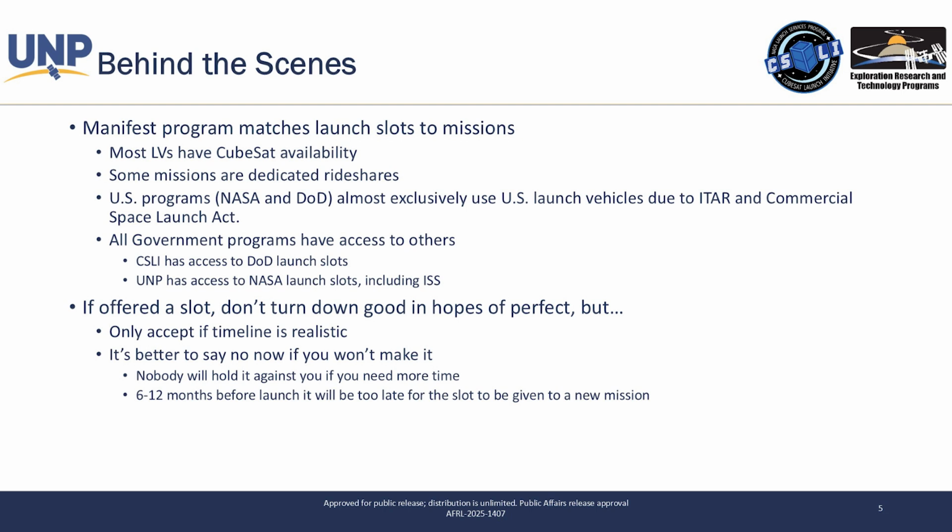The only reason you probably should not accept is if the timeline is not realistic. It's better to say at the very beginning of a slot that's offered to you if you can't make it, rather than trying to make up ground, trying to make up development time. Because in all honesty, there are severe repercussions on us if we can't make those launch dates, in terms of monetary costs, loss of faith with launch vehicle providers and so forth. So if you're offered a slot, think long and hard about whether the timeline is realistic and whether it meets your requirements, and then be prepared to defend why you're not able to make that launch slot if you can't make it.